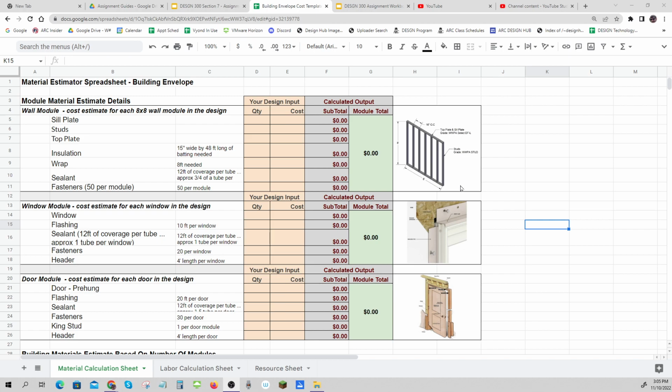Okay, you might have one that's 10 feet long or a wall that's 20 feet long, and you can use this 8-foot cost estimating length called a module to get a quick version of the cost. Now there are some pre-manufactured housing units that are built on these modules on purpose because you can build them very quickly, standard, over and over again, do it very fast, and have quality control. But usually you don't design a module. This is a thought experiment that you would use to estimate with.